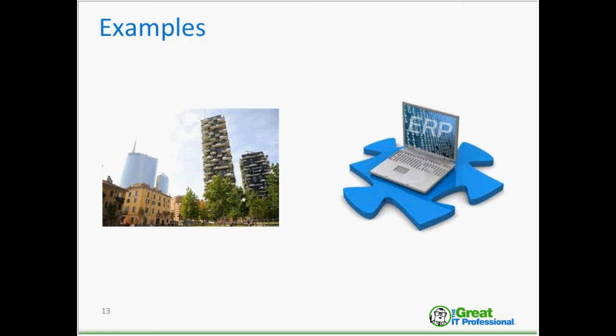Because normally you map in the system, you customize the system, you configure the system by following the business processes. So business processes do not change every day. They change maybe every few years. So we can say, in this case, if people have the competencies, if the contract is right, so there are many ifs, of course, but if we have the right competencies, we can approach an ERP project just like a construction project. Why? Because the critical success factor number one is satisfied.